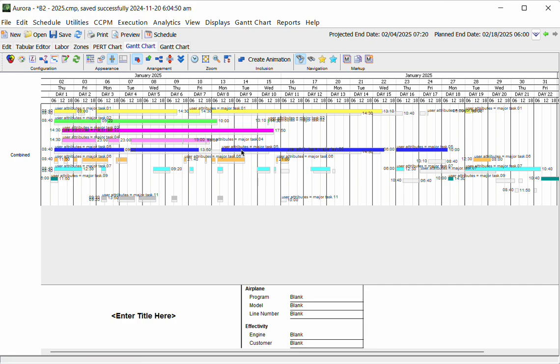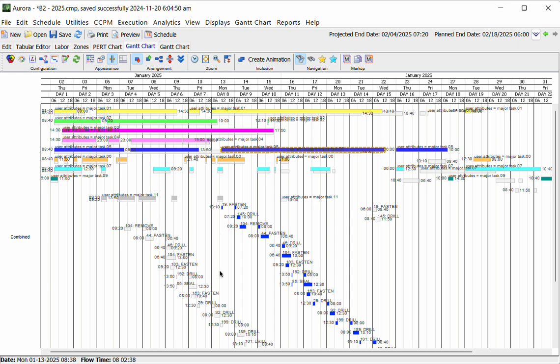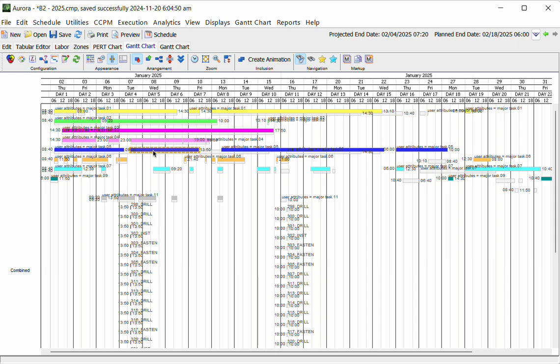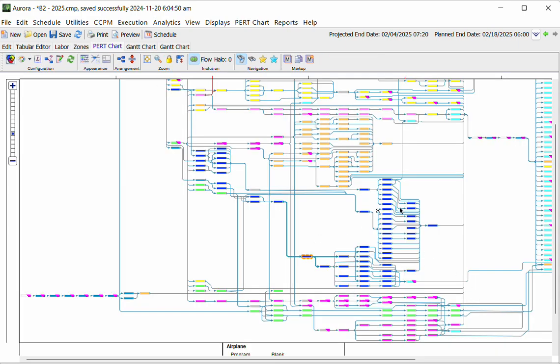Well, if I click on this particular subset of work, you can see that this is actually some of the work that I delayed. So it used to be back here, now it's over here. So logically, that means that this work that I am starting with actually moved much earlier. So basically, in this subset of work, just looking at the PERT, you can see that I have 2 relatively independent chunks of work associated with this subtask. So it basically flip-flopped them. Doing this delay meant that this couldn't start, so it started that instead.